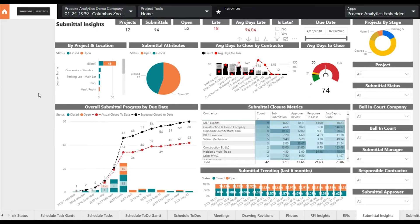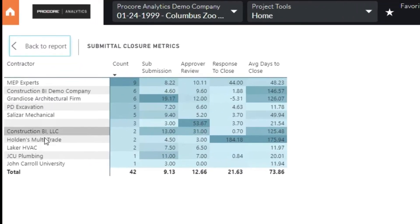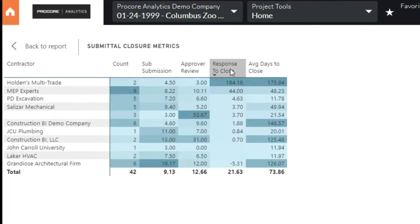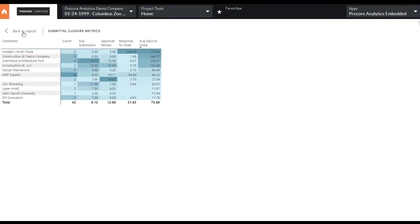This report gives you a tremendous amount of insight into not only the overall status of submittal processing at a portfolio level, but also into how contractors are performing. Seeing this data in aggregate can quickly highlight where certain contractors may not be meeting performance expectations.